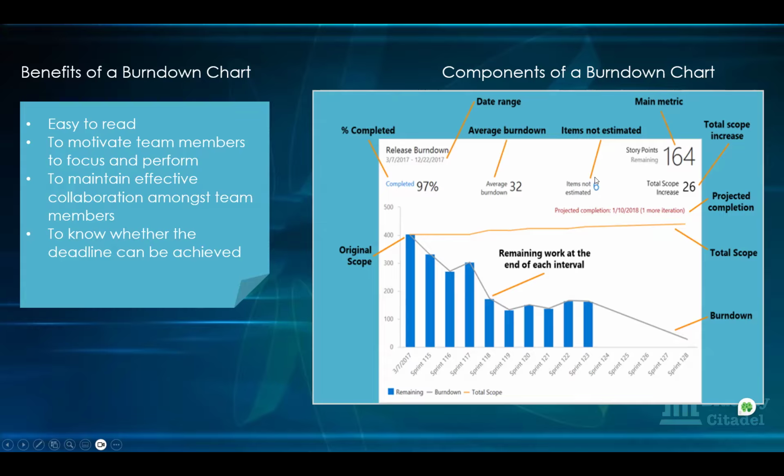And if you as a Scrum Master know that when you were doing the sprint planning, everything was estimated, then you want to check the ones that have not been estimated. Has anything been brought in, in the course of the sprint, that people are not aware of, and the team members are working on it? When you find it on the board, you're able to bring it up at stand-up to say, oh, I noticed we have this in the sprint. I don't know when it came in. If there's a name assigned to it, you're able to check with that person and get an answer or get it resolved. You might be on the board and not see that, but your chart will be able to help you know that there are things like that on the board.